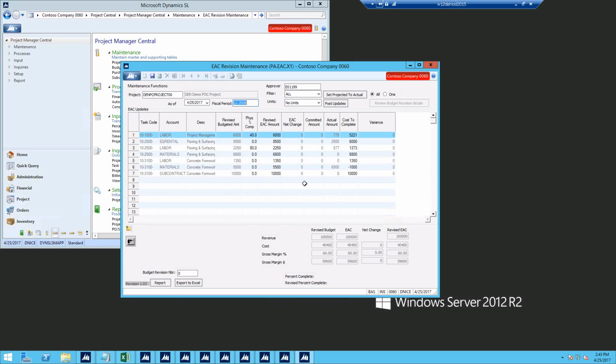What this does is it helps percent complete companies manage their costs, because that's the only thing they can manage. The concept of earned value management is that you are managing the one thing that you can manage, and that's the cost, because the contract is the contract. You signed a $100,000 contract, obviously besides out of scope change orders, but the base contract is the base contract of $100,000. What can you manage? You can manage the costs.